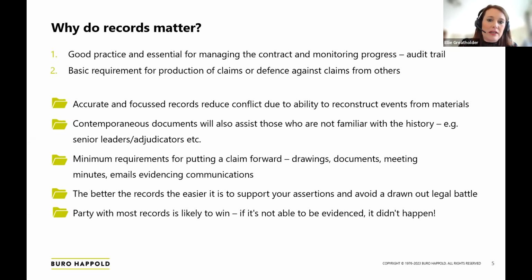And the important thing for me, in order to be able to produce a good claim or a good defence, is being able to look at records to understand for myself what the story is, what happened when, who did what, where's the evidence. There are minimum requirements for putting a claim forward, as I'm sure we're all aware. So drawings, documents, meeting minutes, emails, evidence in communications. And the better the records you have, the easier it is to support your assertions and avoid a drawn out battle.